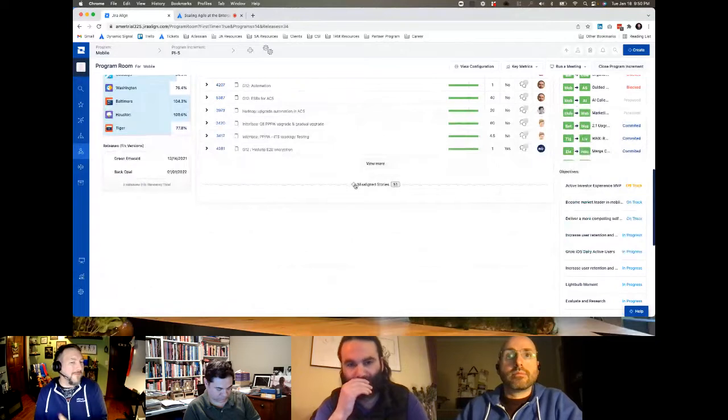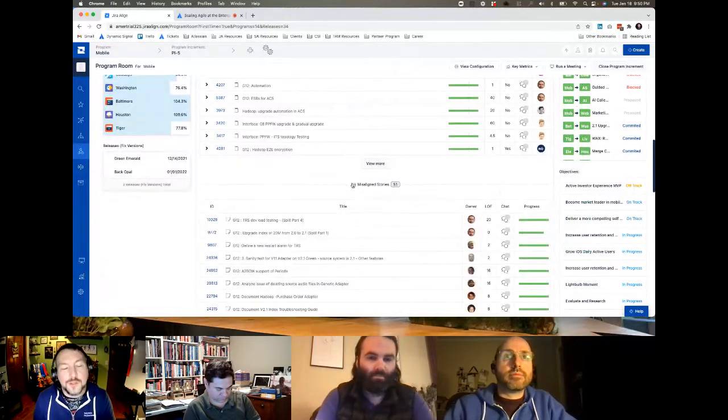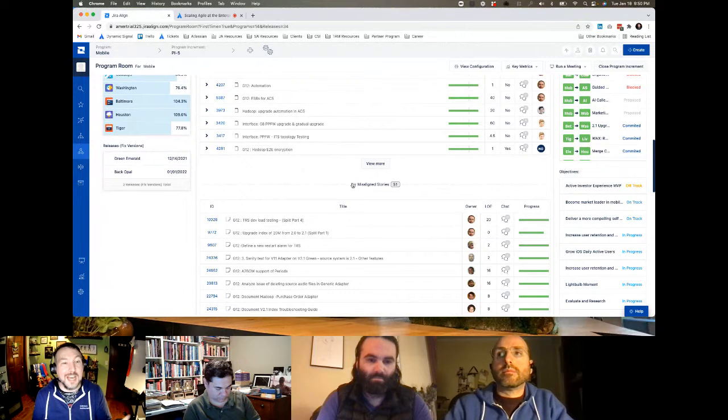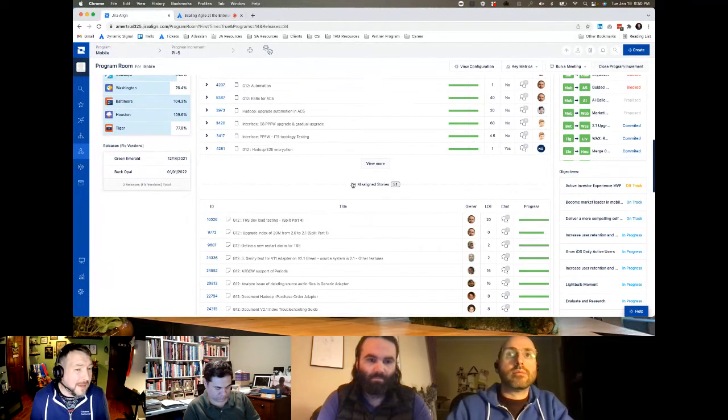Misaligned stories are one of my favorite pieces here, because they represent stories that belong to features or Jira epics that are not in this PI. I like to think of this as potentially rogue work. It's work that's going on that is not associated. Maybe it's not the right work to be doing, but we should ask the question.